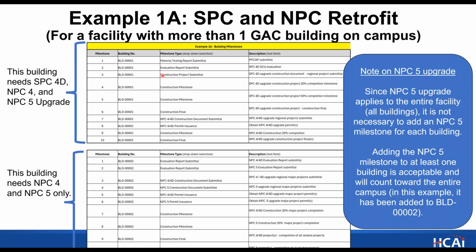Milestone number 3 is a construction project submittal. This is for construction documents or your design drawings. So this is for the SPC4D upgrade construction document submittal, and that goes to the region. So again, this would be the date you're planning to submit those documents to the region.